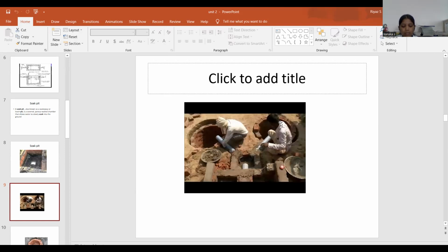So the first one is the cost of labor, charges for compaction for OMC and hire and the running charges of machinery as per the table. And then the item of work per unit, the rate of quantities of the material, rate of labor, etc. So the purpose of rate analysis is to determine the current rate per unit of an item analyzed.